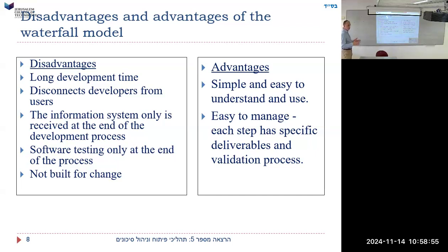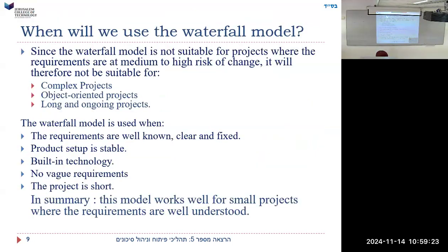But if I'm building a Hanukkah menorah, I start to see it take shape as it goes. Here, I just plan, and it's like I would build a Hanukkah menorah. Just first I would talk about how it should be, and then I would plan it, and then I would design it, and all this stuff, and I wouldn't have anything physically yet. Software testing is only at the end of the process, which is very weird. Because it could be that nothing works when you come to test it, and you've got to go back and do everything again. It's not designed for change. No, you can change things, but it's expensive.